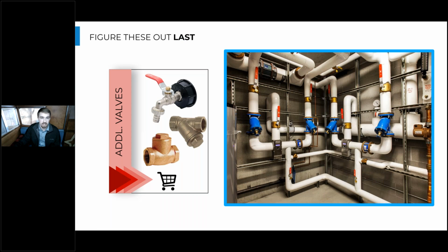And then the last thing that you'll select in detail as an installer will probably be these additional valves that you can get right off the shelf. And I say that with the caveat that there are supply chain issues, so as an installer, you'll know which of these components might be more difficult and need to be ordered ahead of time. But these aren't dependent on the heat pump design itself. They're what you as an installer might be more comfortable with buying and selecting on a day-by-day basis.